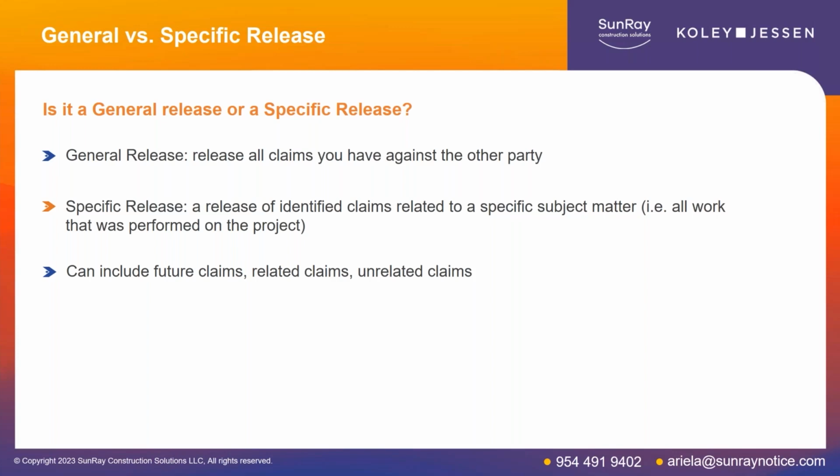Those releases can be effective to reduce claims related to one dispute, but may leave you open to liability or exposure for other disputes. And so it's important to be intentional in understanding, are we releasing claims related only to what we're getting paid for, or are we trying to resolve any and all disputes between the parties?